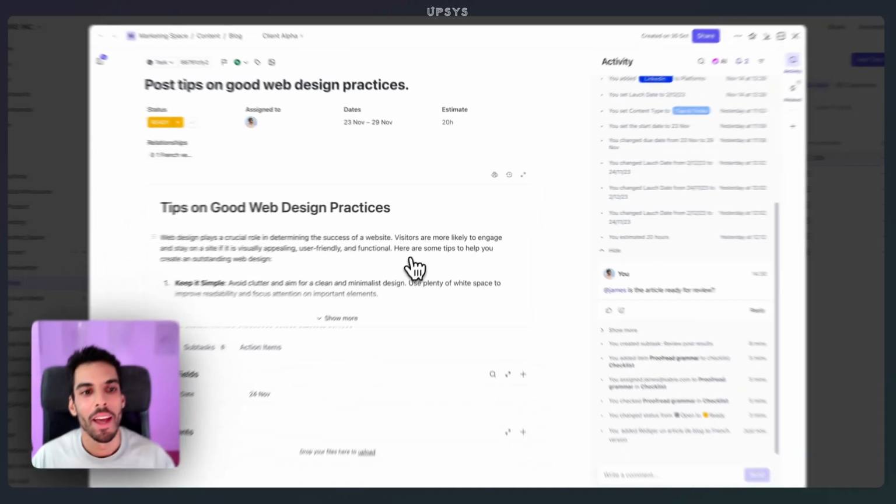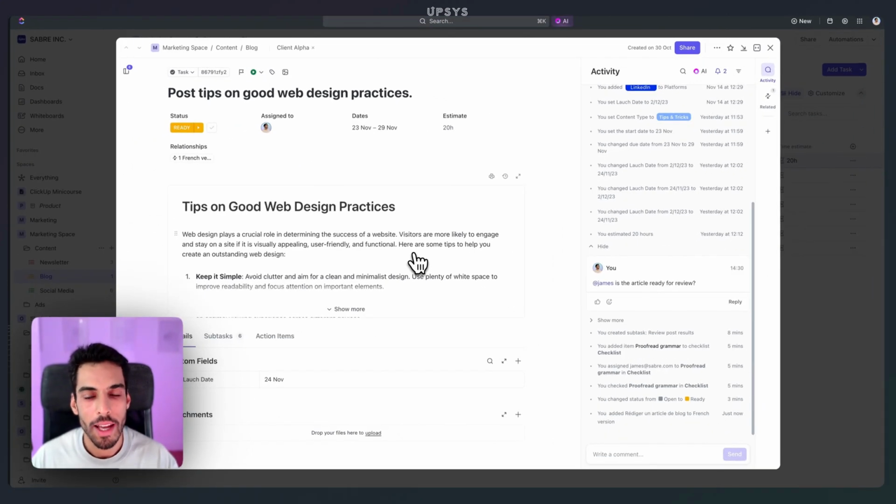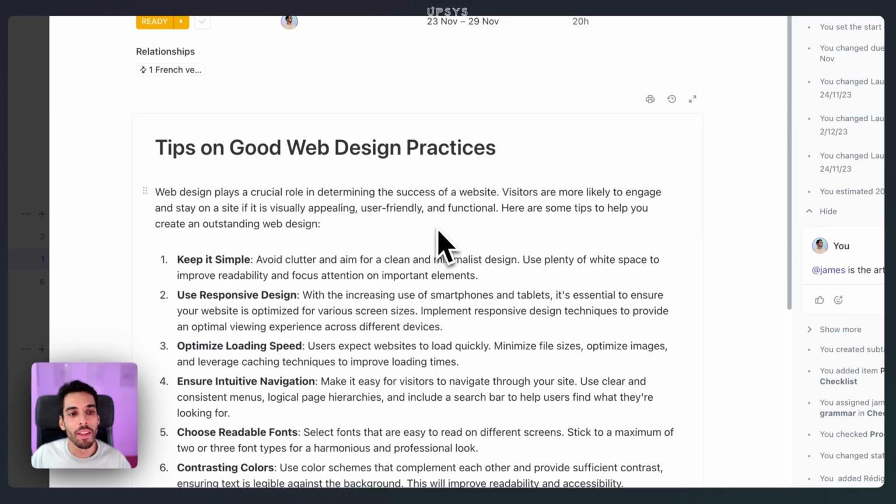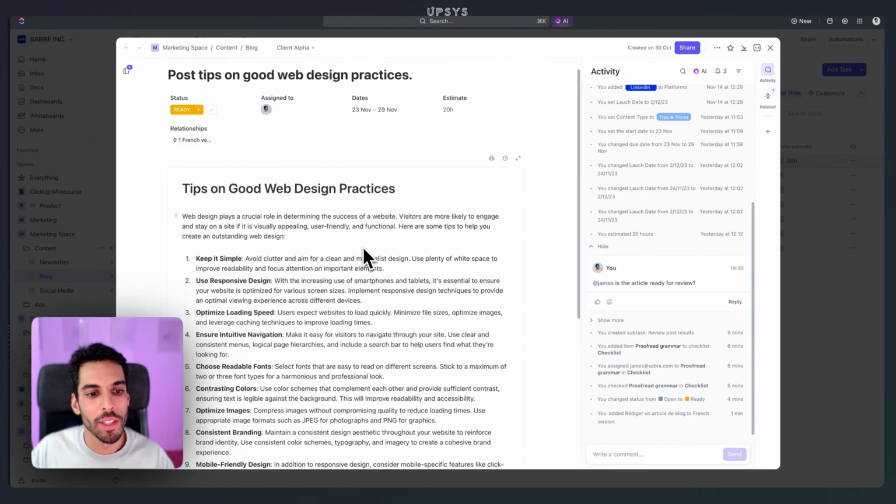We've seen everything you can do on the task, and I hope that makes you realize that there is a lot you can define in a ClickUp task. Make sure you define the right level on every single task on ClickUp. A rule that I have is that the task is refined enough if you have an assignee, start and end dates, and estimates. That's the bare minimum. And then you can add in more details as your team expands and you need to refine information better.